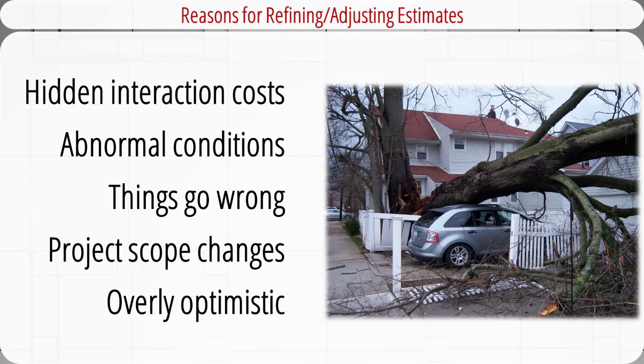Second, resource shortages in the form of people, equipment, or materials can cause errors in estimates because they deviate the project from normal conditions that are used to estimate time and cost. Third, things can go wrong on projects. Extreme weather conditions and accidents, for example, will make the original estimates invalid. Fourth, as it gets further and further into the project, a project manager may receive requests of making changes from customers. When the project scope is affected, the adjustments in time and cost estimates need to follow.